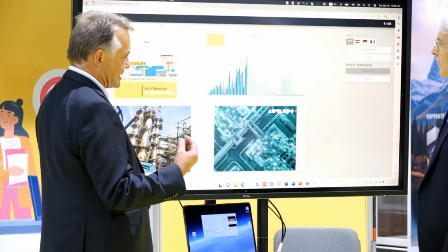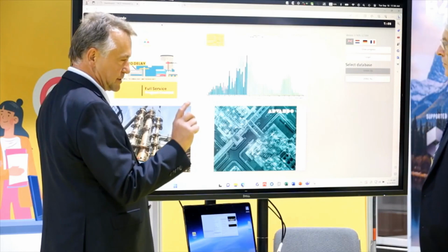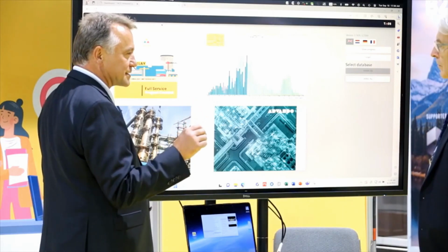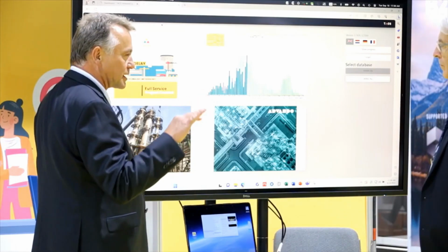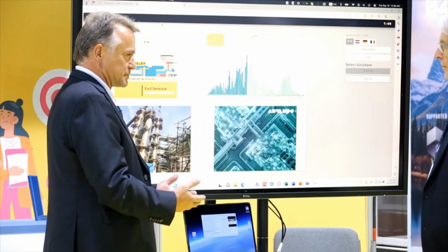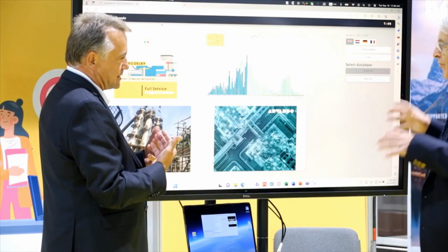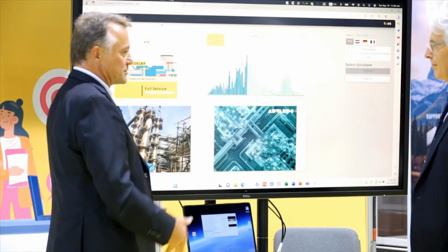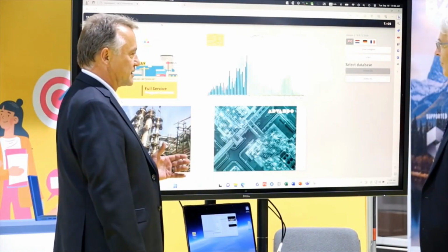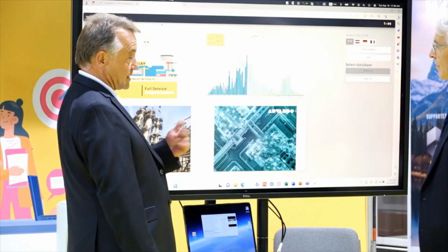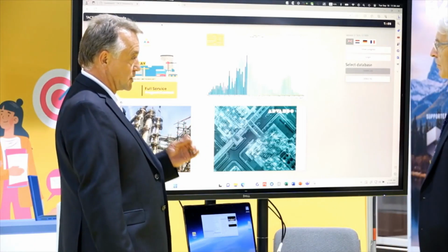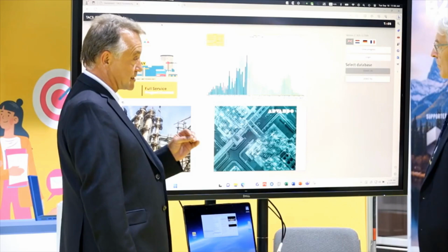To get that feedback, there's typically a feedback cycle in the afternoon, 2:30, 3 o'clock, where everybody is supposed to come in and give their updates, and then you're taking your supervision out of the field. Flood it with information all at once, and then give the schedulers so much information and data to enter that it's just overwhelming. Plus, you've taken your supervision out of the field at a really key, critical time. It's the most hectic time of the shift.